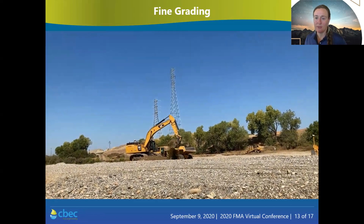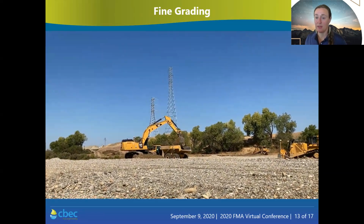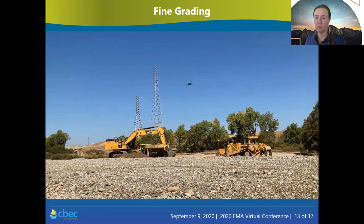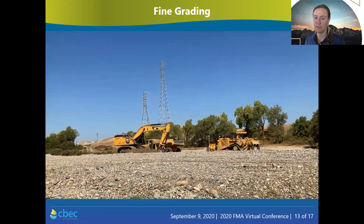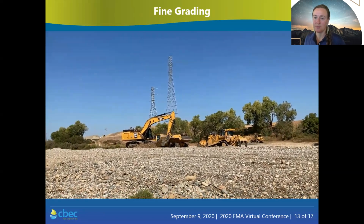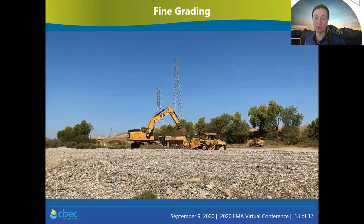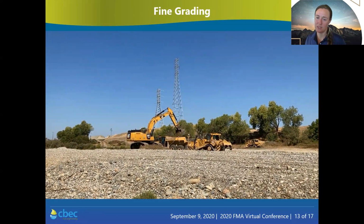They're working their way from upstream to downstream to raise bed elevations in those deep ponds to exclude predators and create suitable depths and velocities for juvenile rearing fish when they're in the river from January to June. The higher elevation upper overflow channel will then be connected to the previously large ponds in the lower overflow channel.